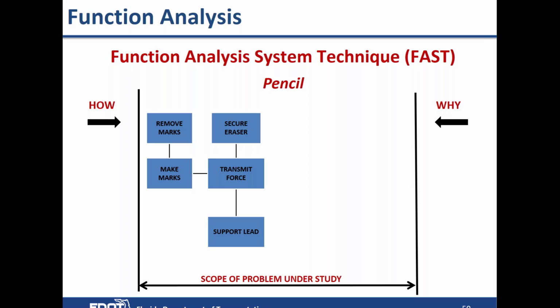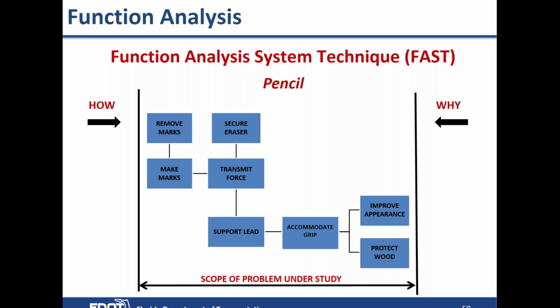And you also have secure eraser, support lead on there. And support lead, moving left to right. How do you support the lead? You accommodate the grip. You improve the performance. You protect. Why do you accommodate the grip? To protect the wood. And then moving in the Y direction. Why do you protect the wood? To accommodate grip. Why do you accommodate grip? To support the lead. And ultimately,